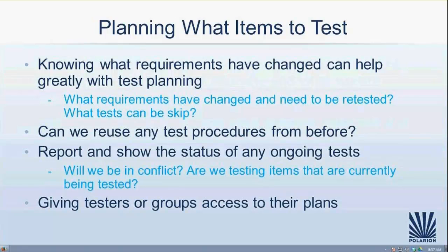Secondly, in planning is knowing if we can reuse any test procedures from before. So this is either test procedures in the same project or related maybe to a different system or something else, or even test cases in a different project. What we find in medical device companies especially is that for a similar line of products, they have a very similar set of test cases. So a lot of times they don't write specific test cases for that device unless it's very low functional level requirements. They'll usually take the same system and user acceptance tests and run them again and again for all their various products along a model line or a specific use case. And so knowing what I can reuse really accelerates my testing process and test planning.